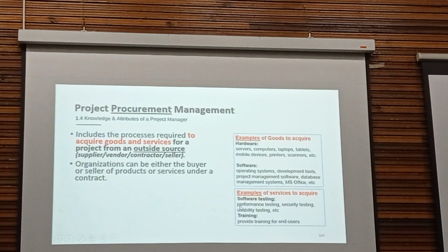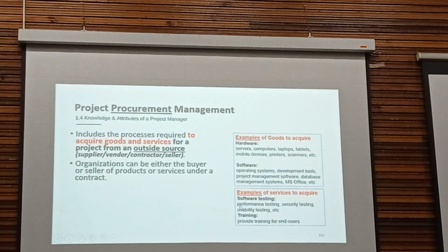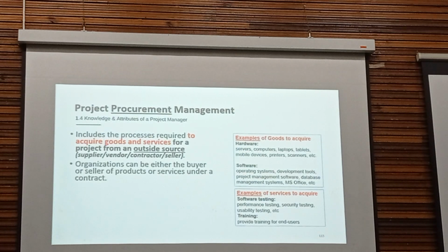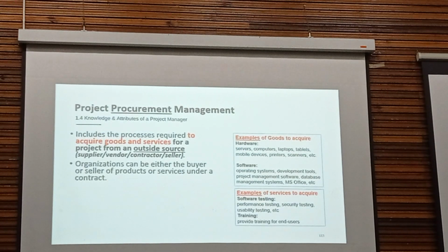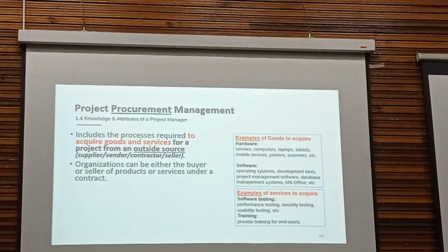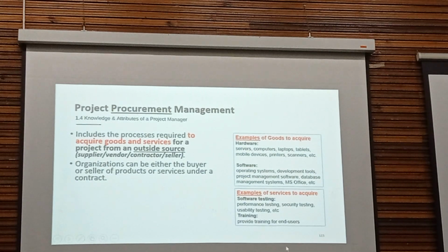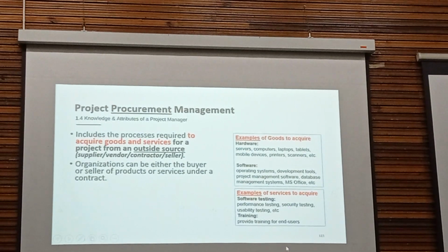To do usability testing, you need a usability lab. You may not have the lab, so you may outsource the usability testing to companies who specialize in it, as well as providing training to end users.